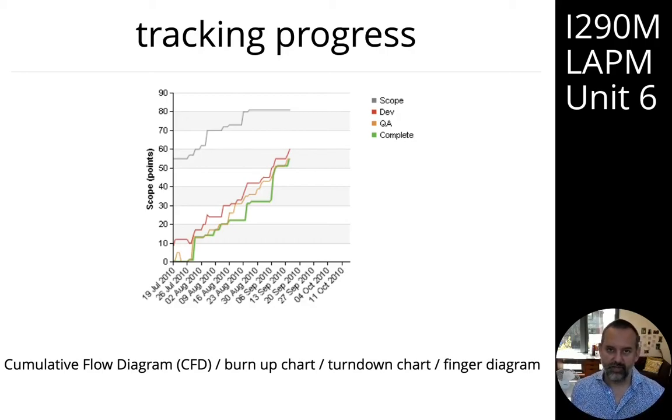The most important thing when you're thinking about tracking work is to have a good definition of done. The best definition of done is work that is released into production or in the hands of users. And again, this is very common in modern times. It used to be the case that you would do an iteration and none of the work you were working on in the iteration would actually be released at the end of the iteration. It would just be accepted by the product owner. These days, we don't do that. We're releasing during the iteration, and the review meeting at the end of the iteration is looking at what work was actually released. And that's a great situation to be in. That's what you should really aim for. And that's the norm with modern software delivery practices.